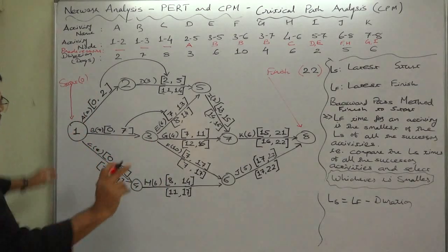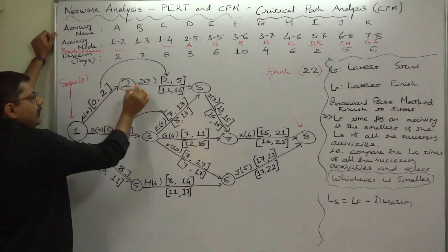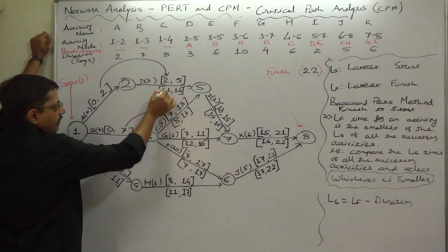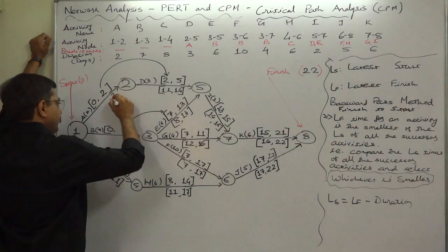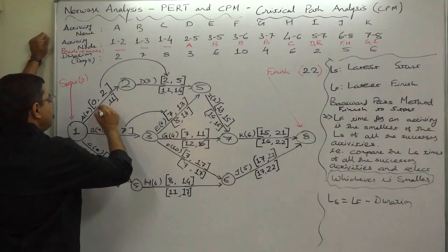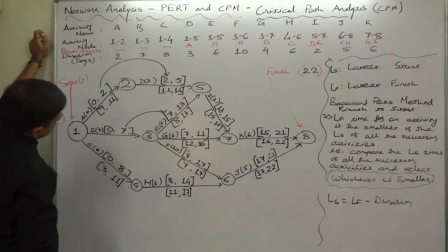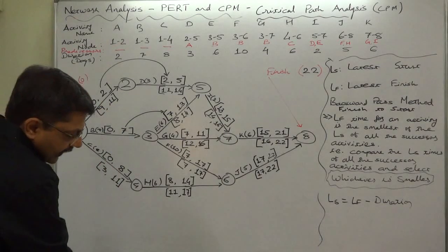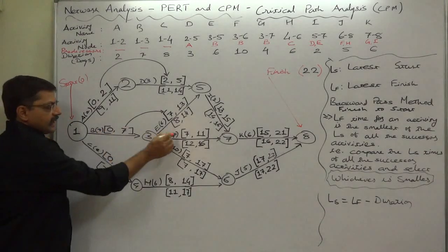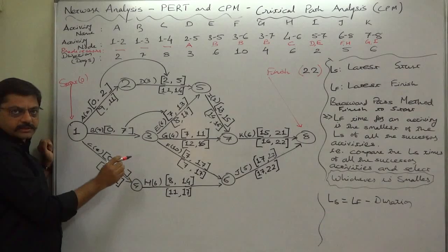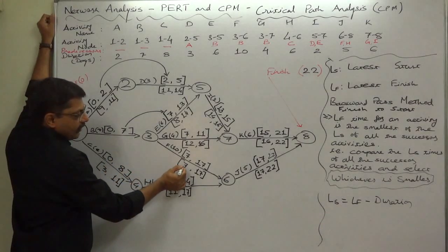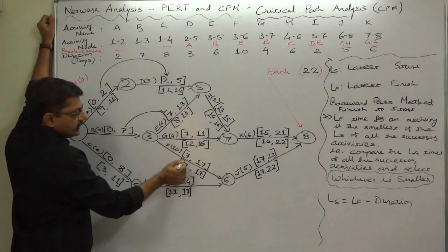For activity A, which has only one successor D, D's latest start time becomes the latest finish time of A - that is 11. So 11 minus 2 = 9 becomes the latest allowable start time of A. In case of B, there are three successor activities, so first take the latest start times of all successor activities.